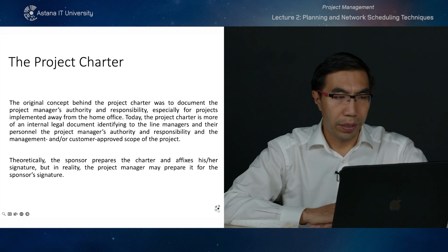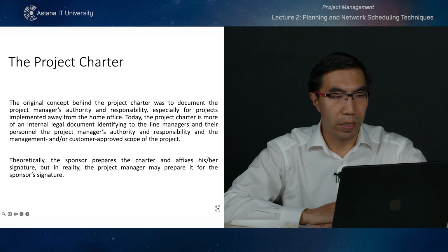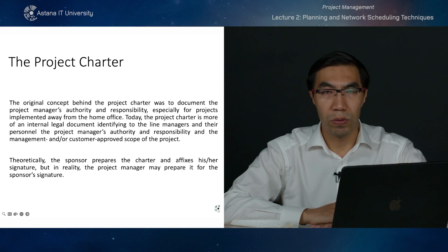So, and here's a definition of the project charter, which is needed for the documentation of the project manager's authority and responsibility, especially for projects implemented away from the home office. So it's more like an internal legal document identifying to the line managers and their personnel the project manager's authority and responsibility and the management and/or customer approved scope of the project. And theoretically, the sponsor prepares the charter, but in reality, usually the project manager prepares the project charter.